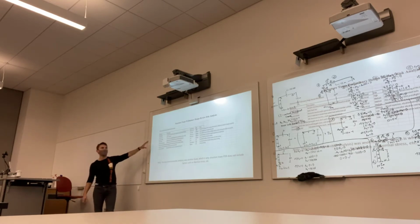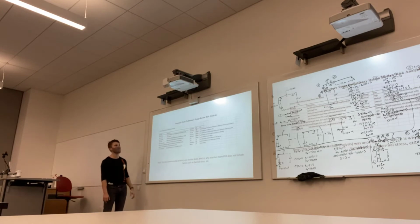Another thing you do, so you have the design requirements. One thing you tend to do a lot for the hardware side is you do a preliminary design review. And one of the things you do for part of that is, you come up with the initial design, you say this is where the rough CAD model, usually come up with a general idea. Something you look at is the risk analysis. So each subsystem typically goes through this process, structures. There's a few things that we looked at, became more involved or less involved depending on how the system requirements changed or how the mission developed.